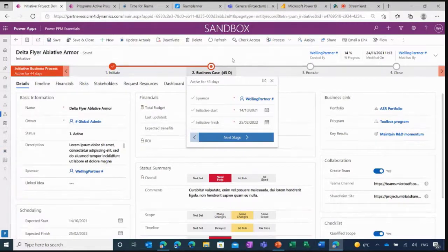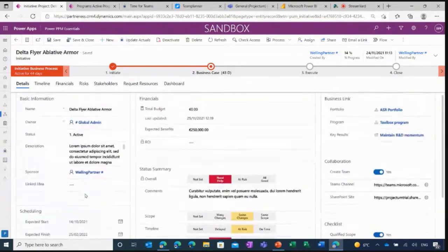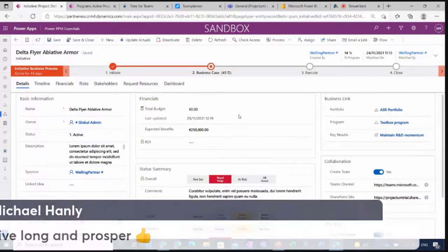So if you go in and you want to run a project of a specific type, then that workflow would update to reflect that project type. In fact, it goes a bit further than that. So if we go into this form, and let's say we put in a specific budgetary value that exceeds whatever the low threshold might be, and it becomes significantly more important, then dynamically we could update the workflow to account for that extra governance that's then required.